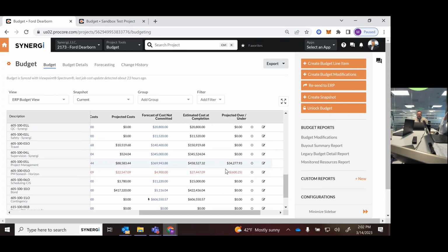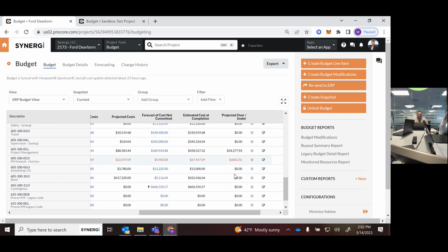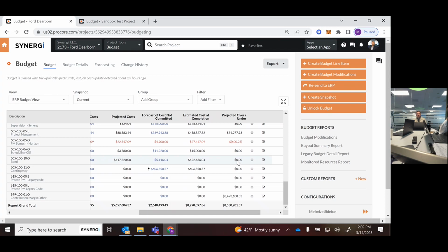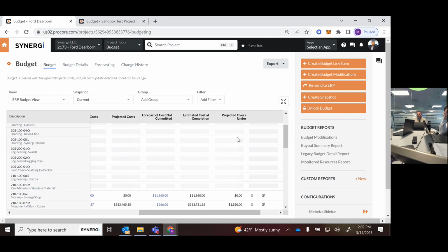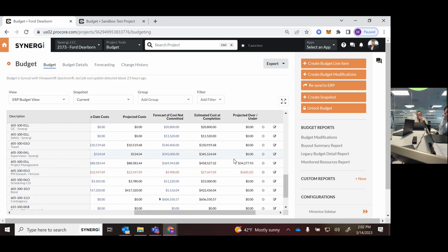So the process every month is to go through and make sure that anything that needs to be done is done. You move the money around with those budget modifications, and then we can snapshot it at the end of the day. It gives you your updated contingency for the month. We very, very seldom ever move our CM number because we have contingencies to pull everything from. As soon as that contingency runs in the red, then you have to pull it from your CM. But that's when all the sirens start going off around here, if anybody touches that CM.